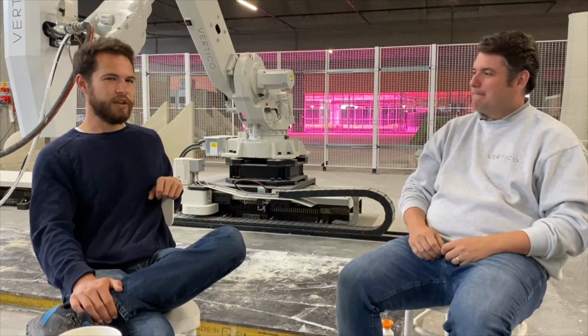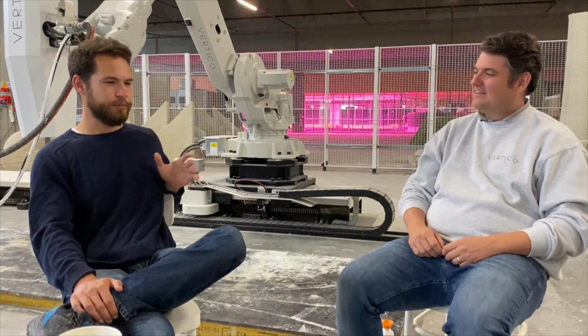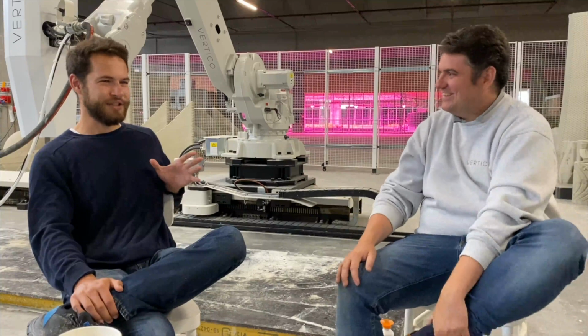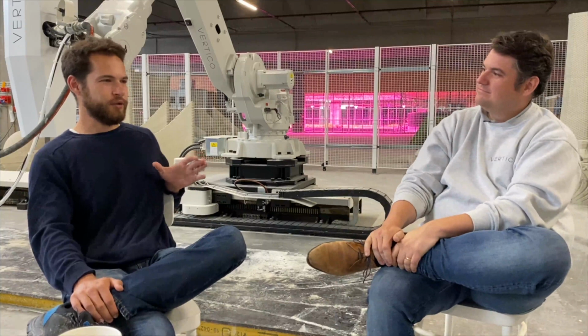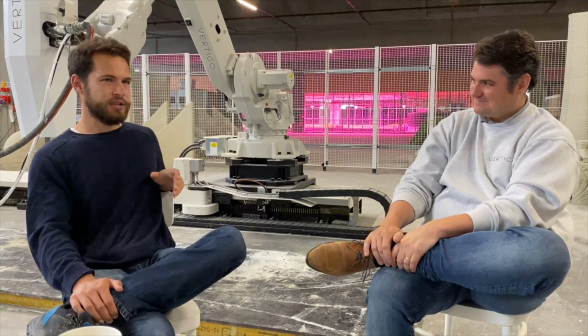Yeah, the vague how-much-do-1,000-houses-cost question is particularly bizarre, because you would think somebody who wants to embark on some project like that might have some construction experience. You'd hope, right? Or some real estate development experience, in which case they would know that construction projects, even if you estimate everything the best you can, frequently go over budget, go over schedule, and the costs are also variable. Anybody who's done even a one-house development would know that the regional costs of MEP, roofing, finishing is all super variable.